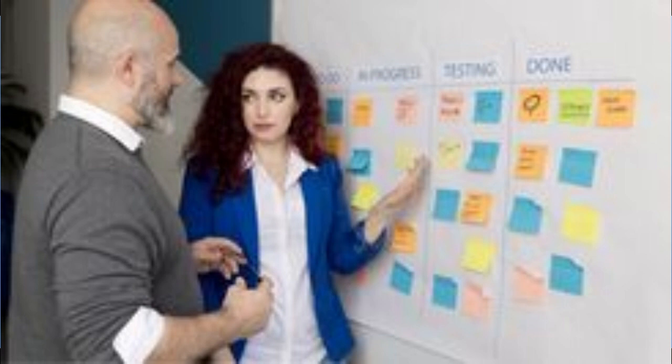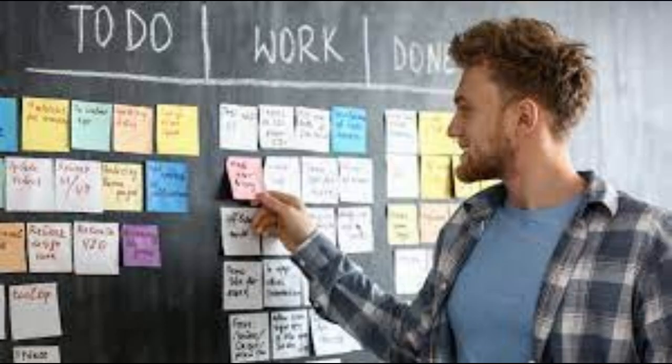Okay, so that means whenever we are completing the sprint, we have a plan that, for example, in the first sprint we will complete the sign up process, in the second sprint we will complete the payment process. In that way, for example, in 5 sprints we will complete the product management or product catalog of the e-commerce. So basically release planning is an activity in which we plan the features which are required for a product, and how we will complete those.